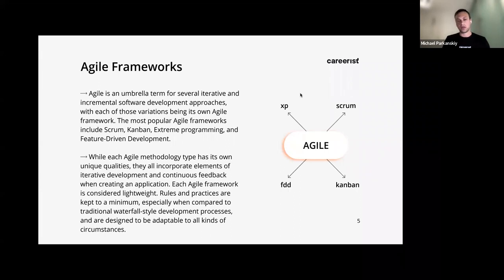Once you get an approval on the requirements, you can't go back. If you have to make an adjustment to the requirements again, you have to send it for approval, which could take a month, two, maybe a year to get an approval on any change you want to make to the software. And that's why you're kind of stuck. And that's usually the waterfall approach there.